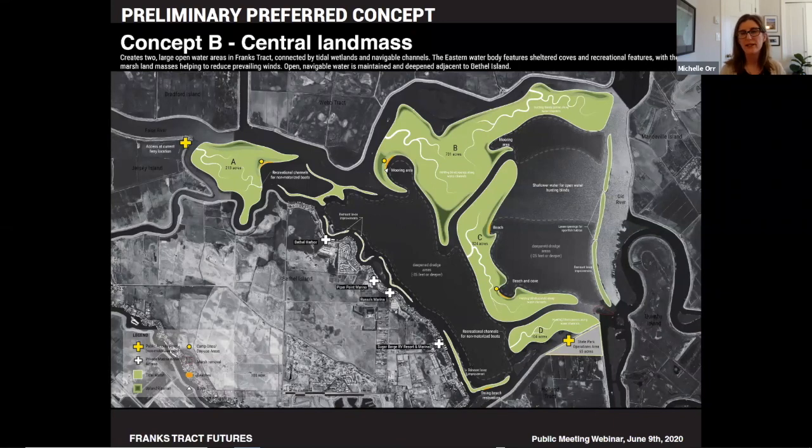The first one is that there would need to be turbidity control with any construction, and that would be required by the permits as well. That means either having containment berms built all the way around where you're placing fill, so that any silt and sediment couldn't get out of your construction area, or using silt curtains to keep turbid, silty waters from moving out of your construction area. That's a pretty major undertaking, but recognizing that that might be what's needed.